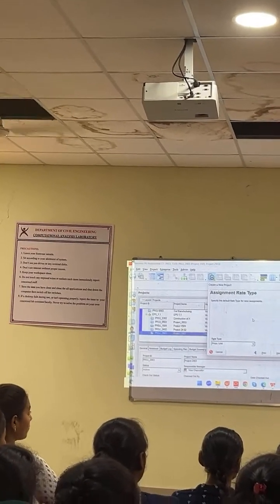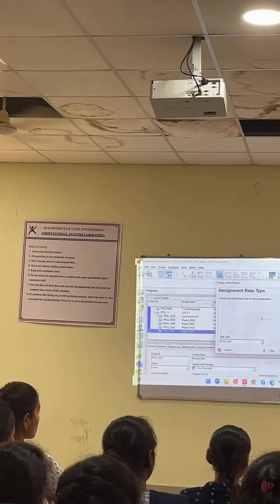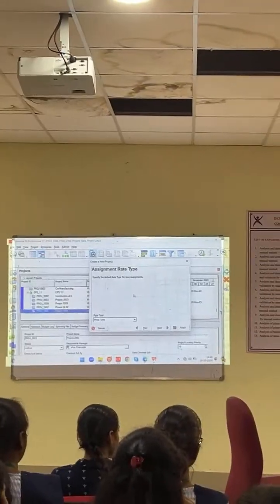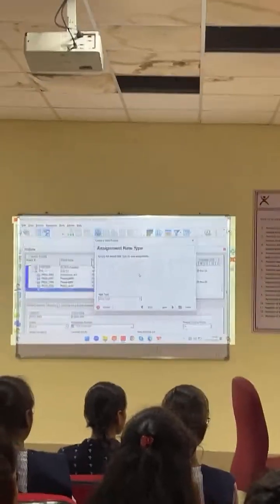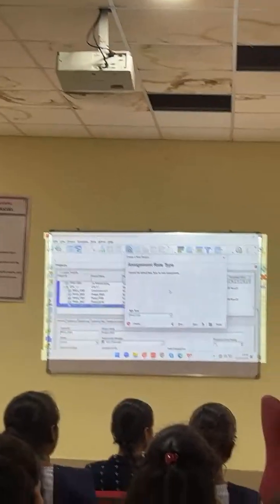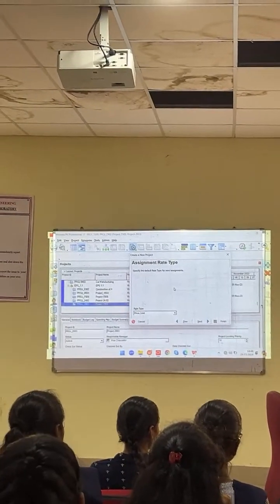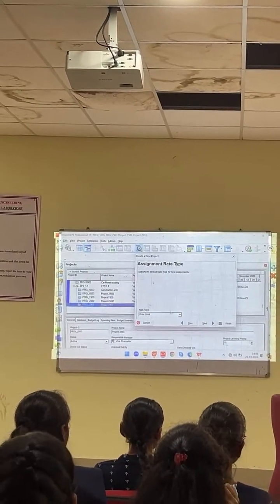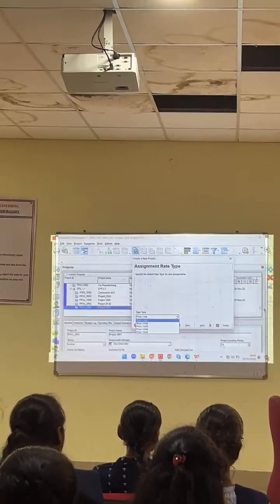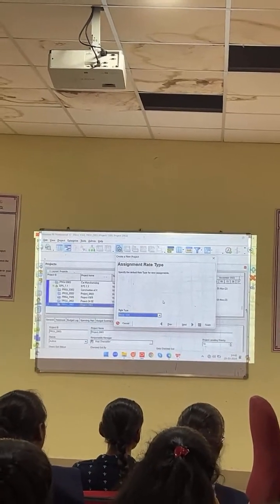It will be a fixed team. So every day the entire team works, that is the cost. So whatever they do, they may be coding, they may be designing, they may be planning, they may be documenting, they may be testing. The cost will be the same. So in IT project, you can choose a default rate. Out of 5, you can choose default rate, but not in civil and mechanical.